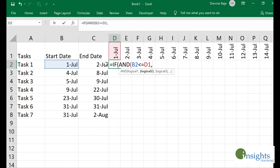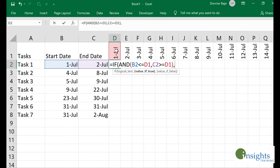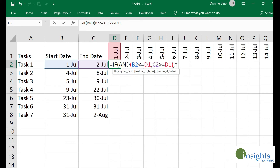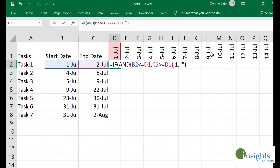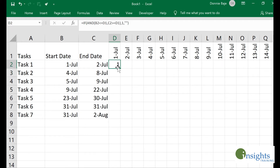At the same time, I also want to check if the end date is greater than or equal to that same cell. For those who are not familiar, the AND function combines logical tests — both conditions must be satisfied in order to get a TRUE result for the IF statement. For the sake of example, I'll put a value of 1 if both conditions are satisfied, and nothing if they are not. Pressing Enter shows a 1 because the cell satisfies that condition.